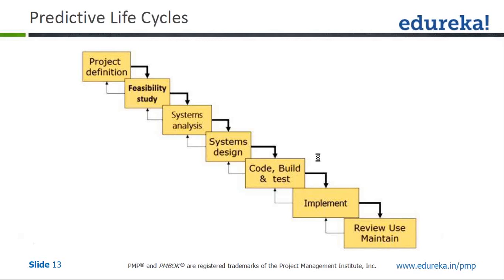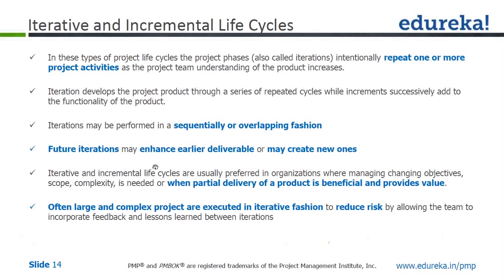In iterative and incremental project life cycles, the project phases — also called iterations — intentionally repeat one or more project activities as the project team's understanding of the product increases. Iteration develops the project product through a series of repeated cycles, while increments successively add to the functionality of the product. Iterations may be performed in a sequential or overlapping fashion.